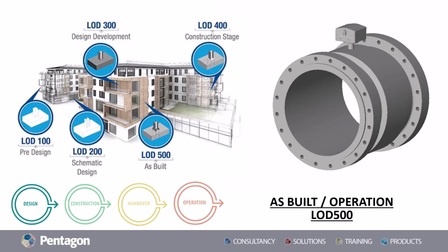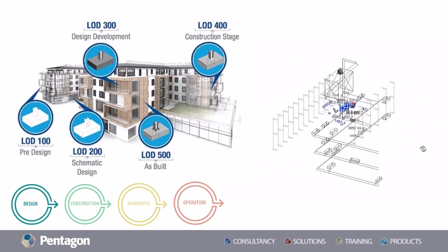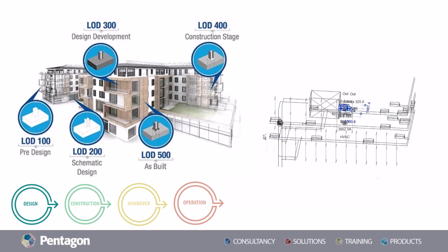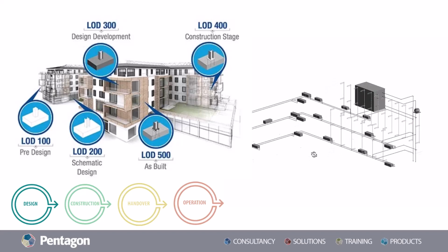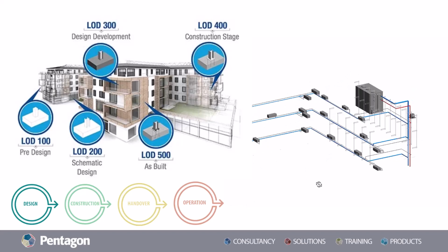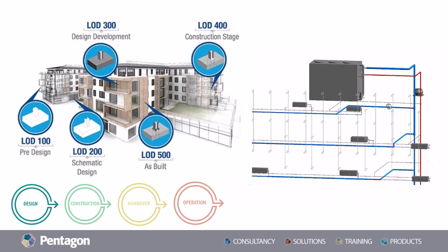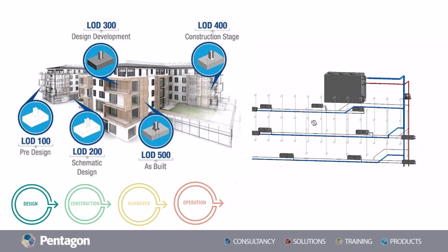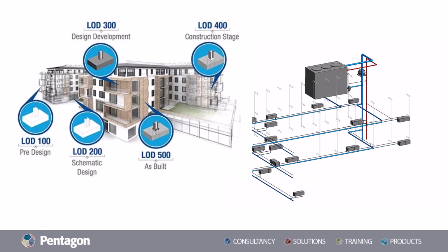We can work with you to determine the appropriate LOD of your project, whether it's LOD 100 for conceptual design or LOD 500 for as-built and everything in between. You can rest assured that our models are created to accurately represent the appropriate level of development while utilizing high fidelity data at these important stages to ensure your design vision is accurately represented and coordinated.